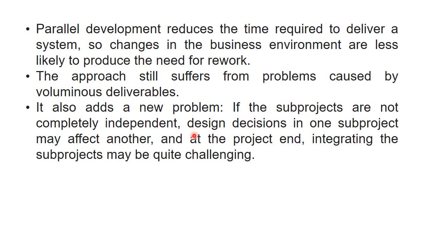So there should be the condition that if all the sub projects are completed, then we will be able to deliver the system. So the main advantage of parallel development is that it is less time taking, but the disadvantage is that if any sub project is not completed, we are unable to integrate the others, and it might take time to deliver our system to our users.